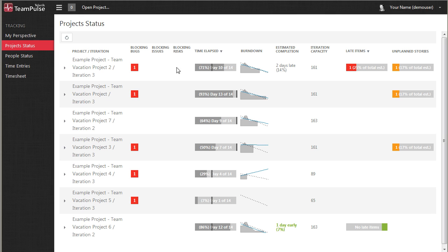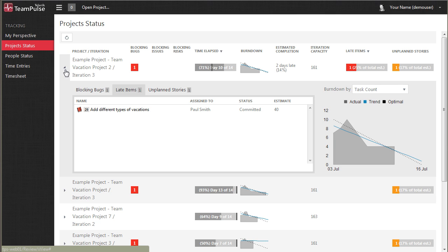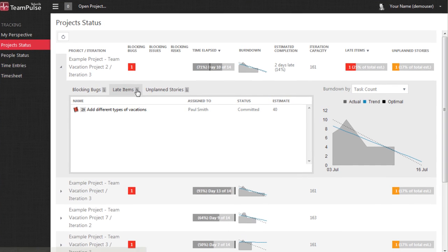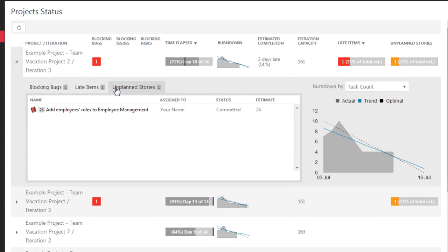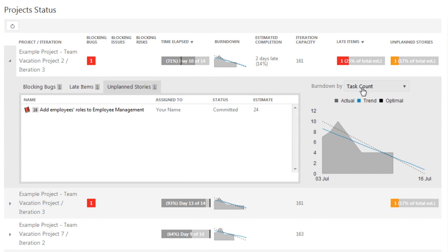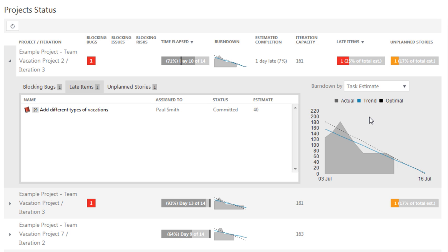Another important feature that TeamPulse allows us to do is see where the scope is changing. So what changes have happened since the beginning of the iteration through the iteration progress, so we can see whether we're actually seeing scope creep in terms of addition of new scope, or whether we're seeing change in scope due to the fact that our original estimates of complexity were incorrect and we're seeing more tasks and more hours put into the features that we had included in scope.